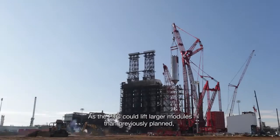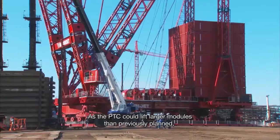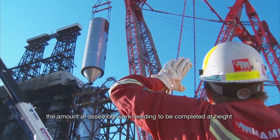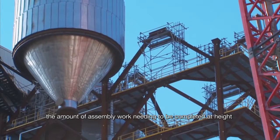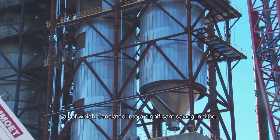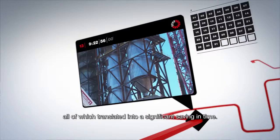As the PTC could lift larger modules than previously planned, our approach would minimize the total number of lifts required, the amount of assembly work needing to be completed at height and the need for ground transportation, all of which translated into a significant saving in time.